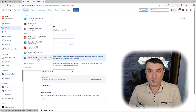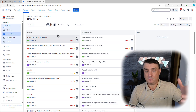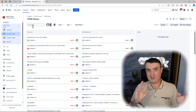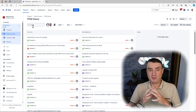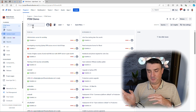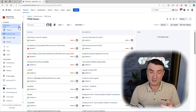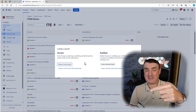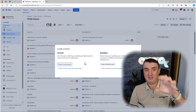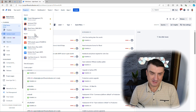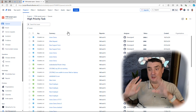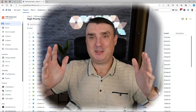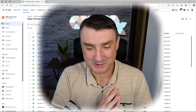You can create a board in almost any other Scrum or Kanban project. Sometimes clients want to see JSM tickets inside of a Scrum project — that's absolutely possible. Your JSM must be in a company-managed project. You go to Create Board and start configuring that board, assigning tickets from that specific JSM project inside of this new project. This is the second method — how to create multiple boards for your JSM project. It's a little bit more advanced, but if you need help you can always contact us.